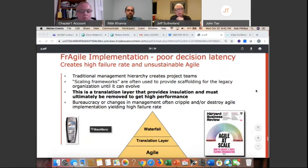I want to mention back to process efficiency because I don't have this slide in here. A team in India, I was working remotely with them. Process efficiency of your stories is in your Scrum tool. You have the data already. You do not need to collect any other data. Collect that data and put it as an item when you open up your Scrum tool. You want to see the running process efficiency of a story. And in their tool, they started a sprint. It was running at around 5 or 10% on Monday. By Wednesday, they had it to 80%. And on Friday morning, they were done with everything in a 2-week sprint. In 4 days. It was really funny.